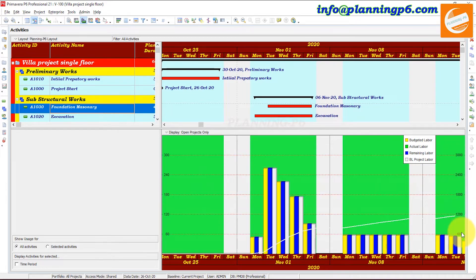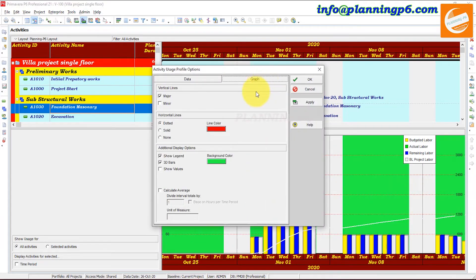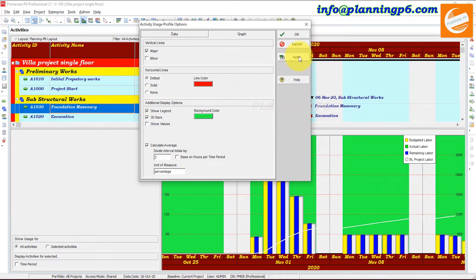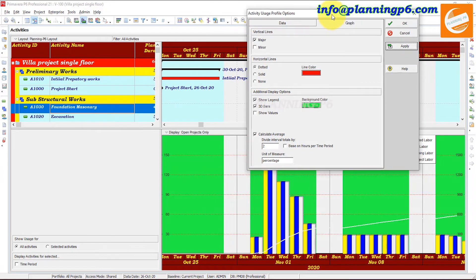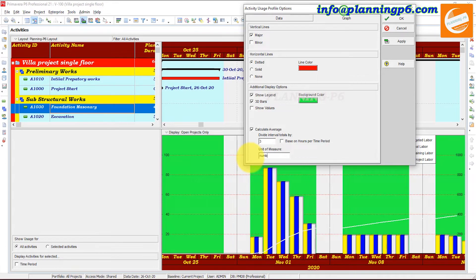It must be divided into five sections by default in Primavera P6 — you cannot divide it into four or change the values directly. However, in the Activity Usage Profile go to the Graph section. In the Graph section, you can put the average of that one. You can calculate average — for example, divided by two — and set the unit of measure to percentage. After applying, you can see the cumulative values are now divided by two, still in five sections.